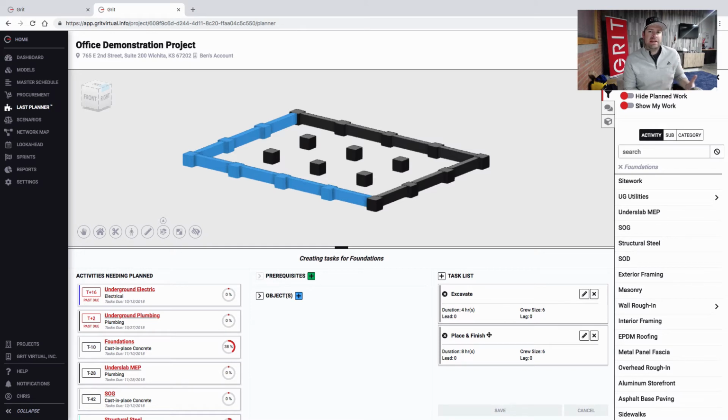Effectively, we've broken one activity down into 6 individual work packages that are discrete in the fact that they use the same materials, tools, equipment, manpower, and information as each other and don't share them across these task lines.